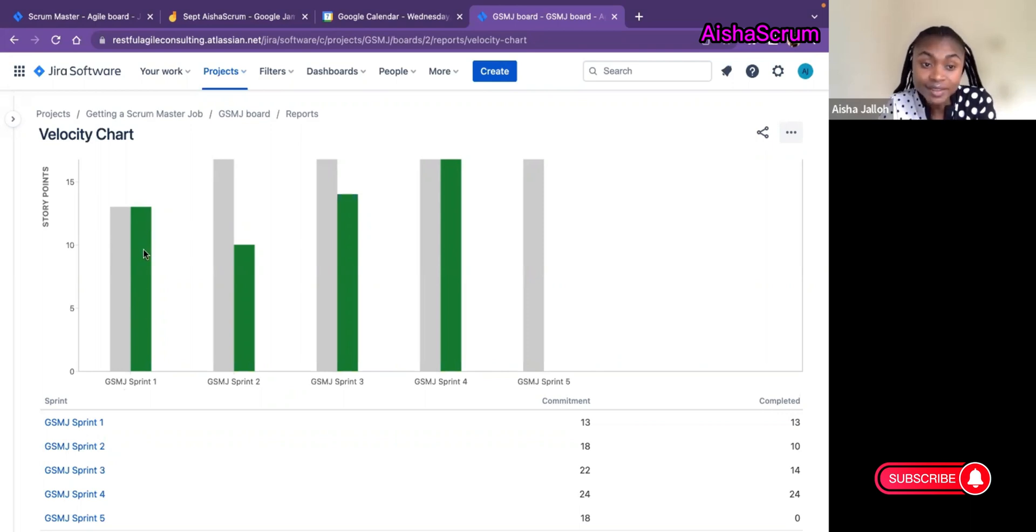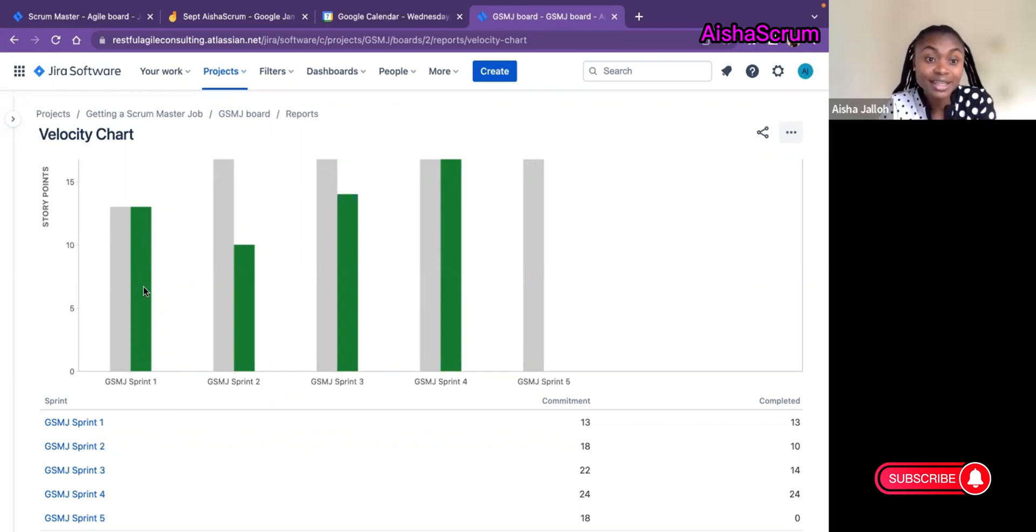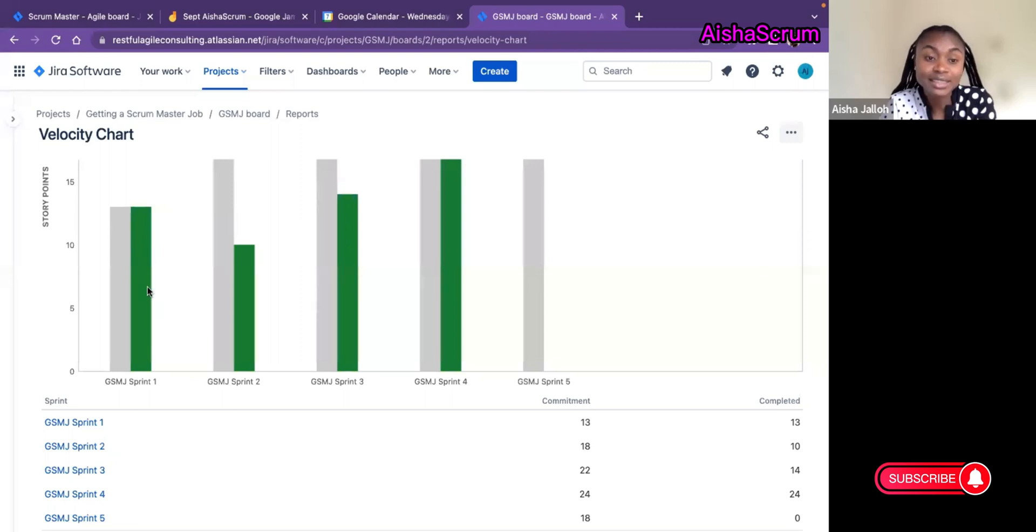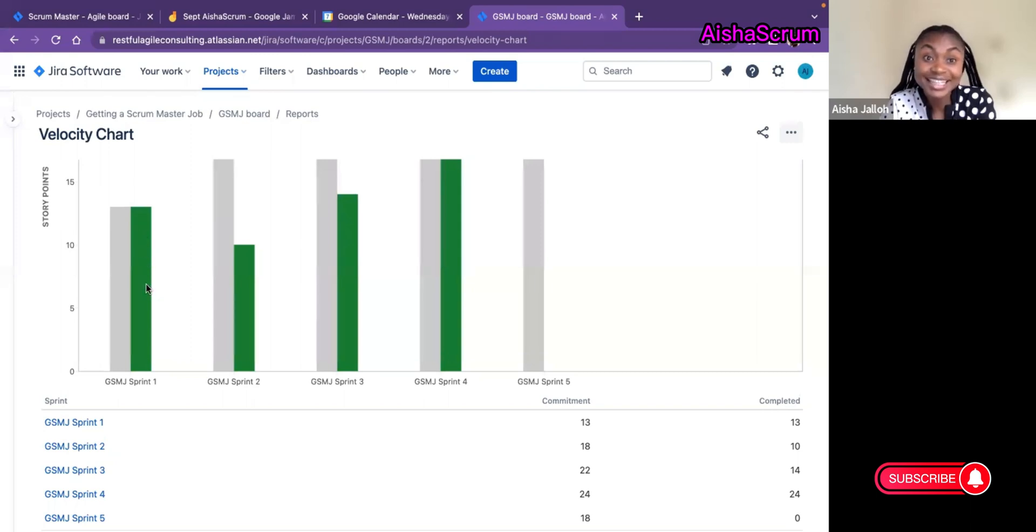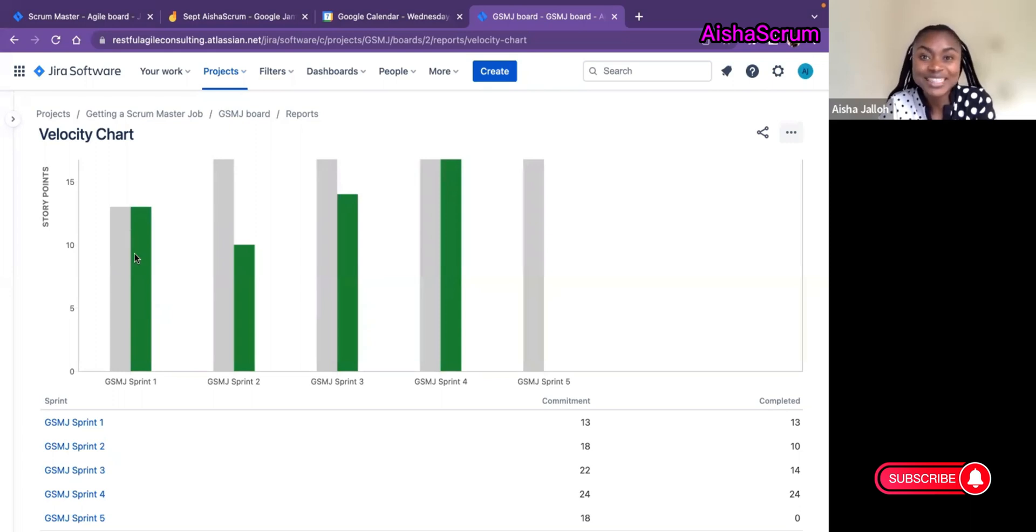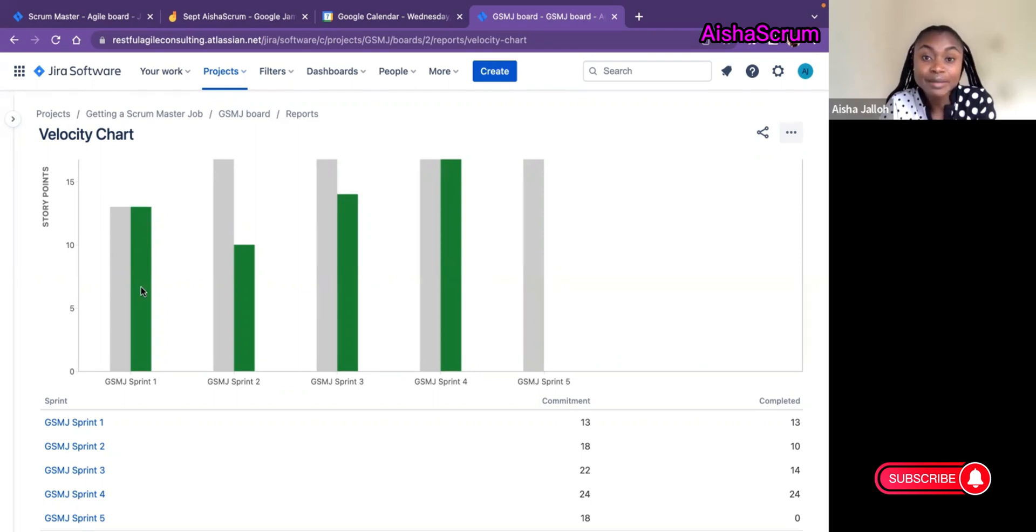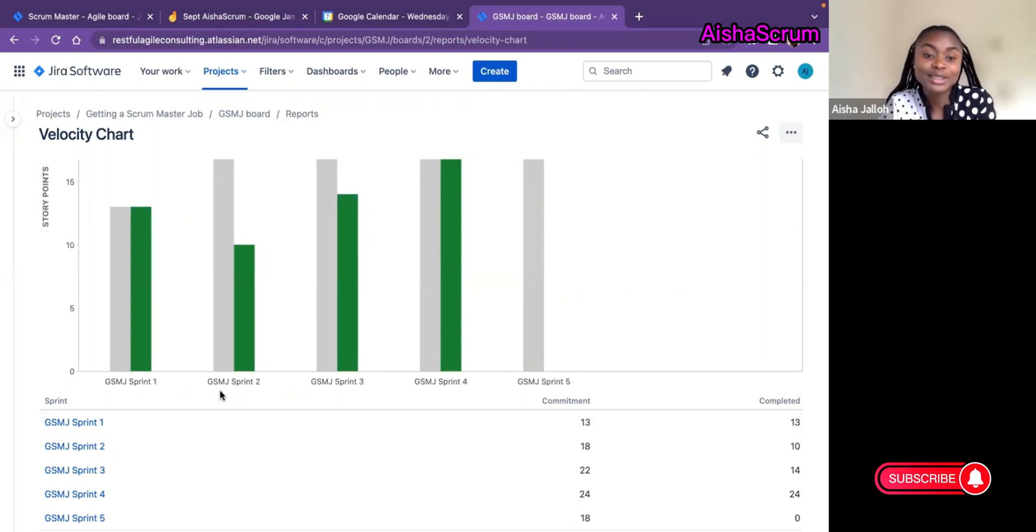In the beginning we stated that we'll complete 13 story points, and at the end of the sprint when we closed our sprint, this team also completed the exact amount they committed for, which is 13. Sometimes you rarely see this, but in this case for Sprint 1 this actually happened. This team committed to 13 story points and they completed 13. Now let's look at Sprint 2.